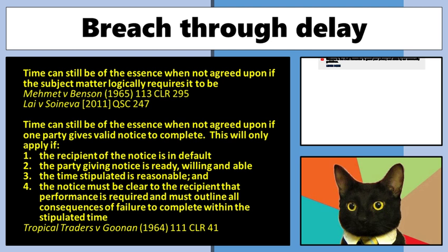And not only that, you can map out ahead of time what the consequences are going to be, both to ask them to do things, but also instructing them that if, and I'm not meaning this in terms of threatening them, if they don't do it by a certain time, for example, we're going to have to go and find third parties to complete this particular thing in order to achieve our particular business results.